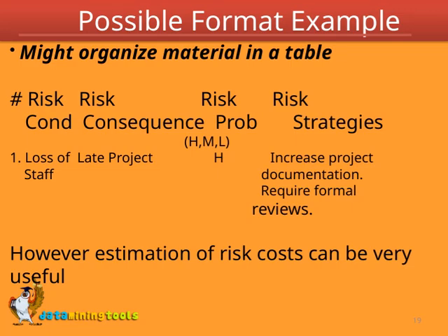Let's consider how we might organize risk information effectively, often using a table format. This table typically includes columns for the risk condition, the potential consequence, the probability of that risk occurring, and the strategies we can implement to mitigate it.